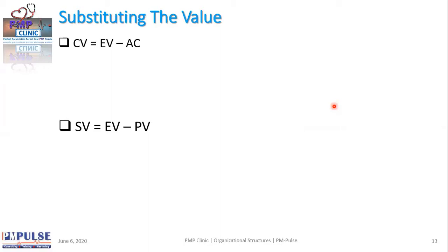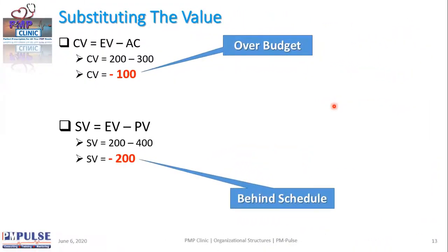And do you remember the earned value variables, right? So the EV was 200, AC was 300 as per our previous calculations, right? And we realize its CV is 200 minus 300, and therefore we actually have a negative variance. And negative variance is dangerous, it's bad, therefore we are showing it as a red color. And the fact that you are calculating everything, even the time in terms of currency.